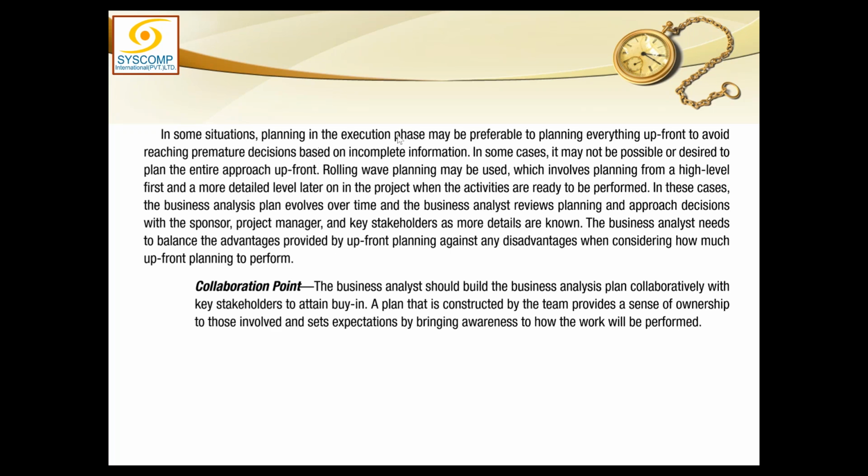In some situations, planning in the execution phase may be preferable to planning everything upfront, to avoid reaching premature decisions based on incomplete information. Actually, it is describing the same concept, which we used to call progressive elaboration. Naturally, if the requirement of this work is very well defined beforehand, then I can plan everything beforehand. But if the facts are not available, if I have to make a lot of assumptions, if there are a lot of uncertainties, and I understand that over time I learn more facts and will be able to refine my plan, then definitely I cannot do all the planning upfront. Therefore, it would be preferable to wait for execution to refine my plan.